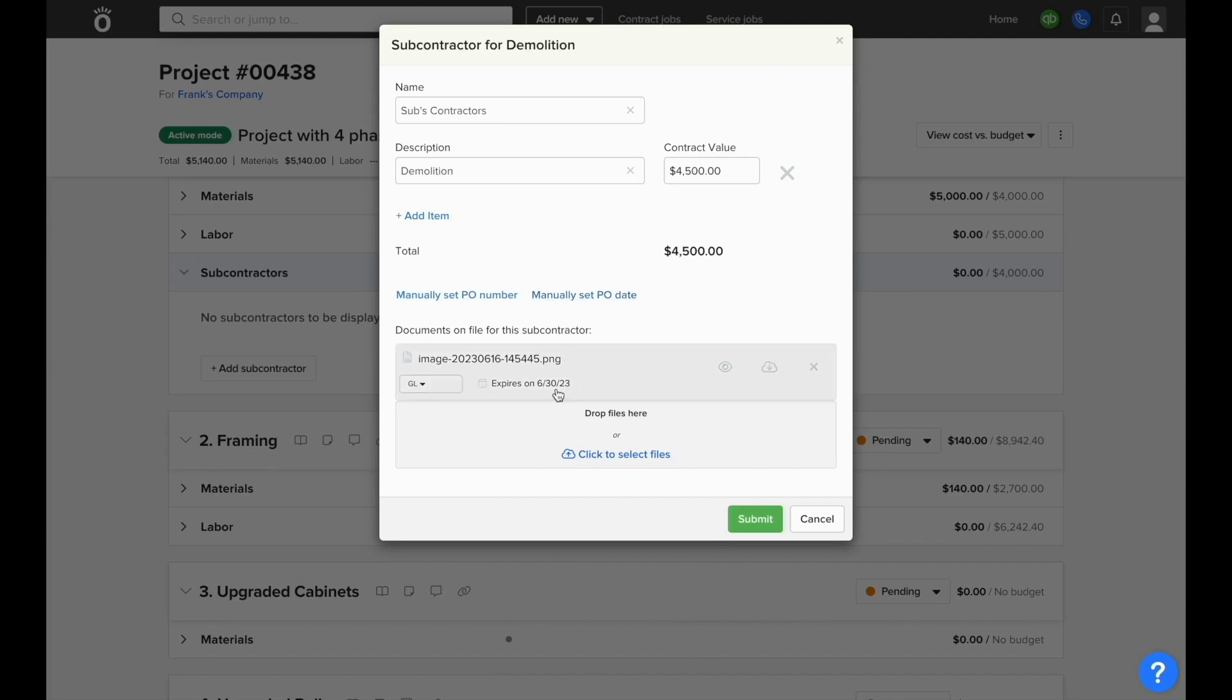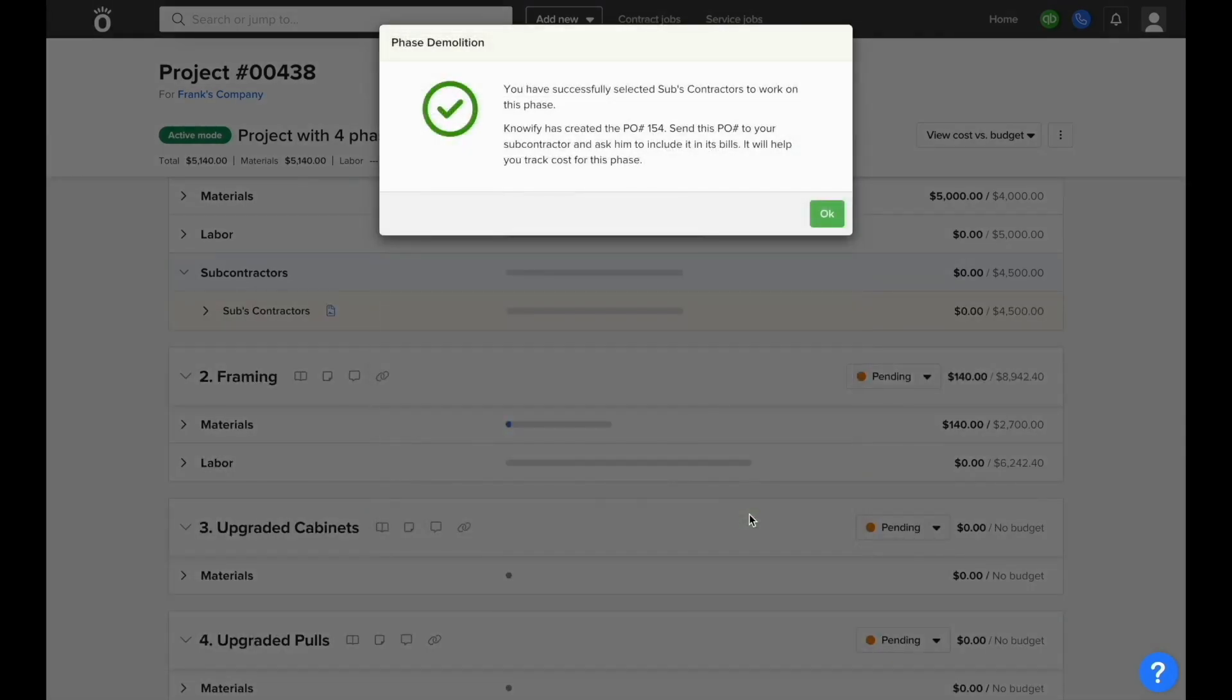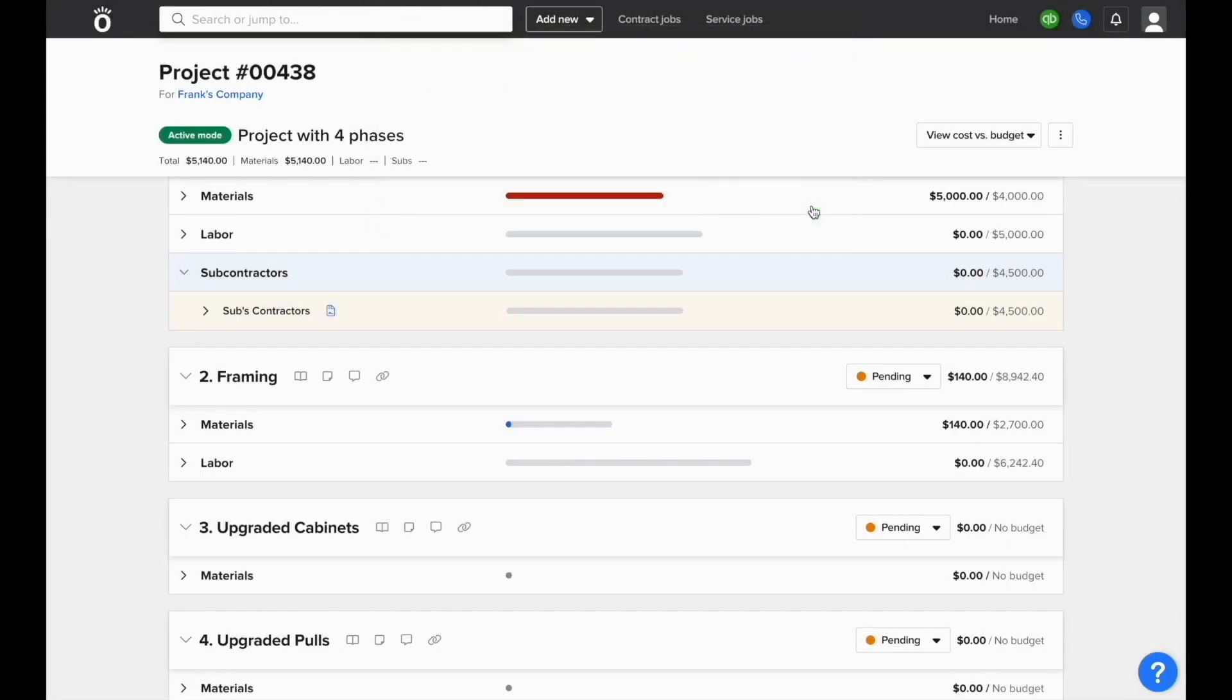We'll also be able to see the documents that are uploaded and when they expire, so that way we can see if any expired documents are on file when we're adding this sub to the job. This will generate a PO which could be sent to the vendor if necessary through the purchases screen.